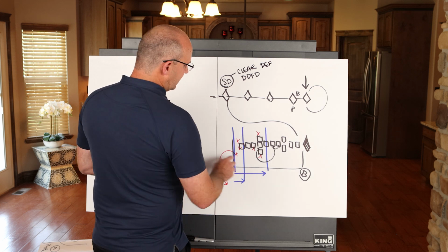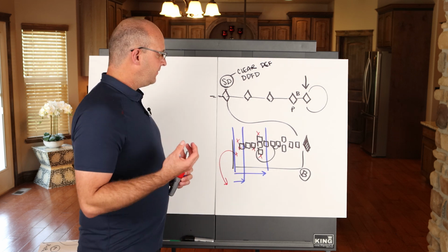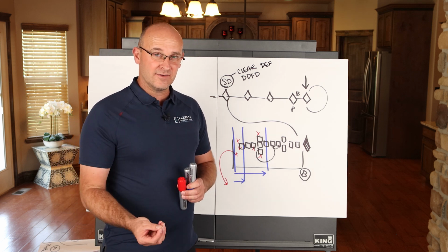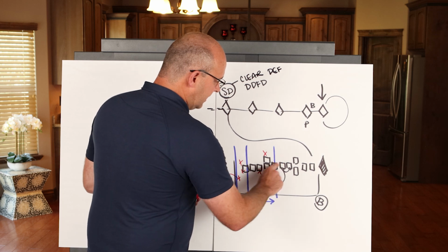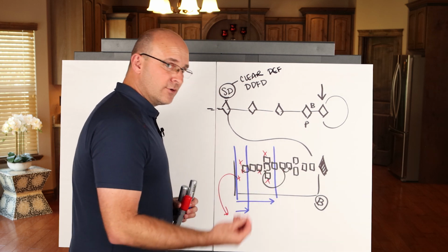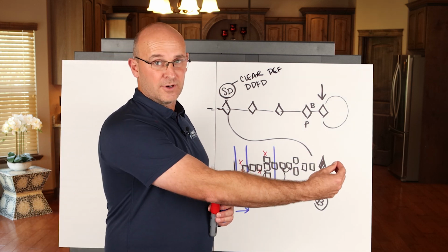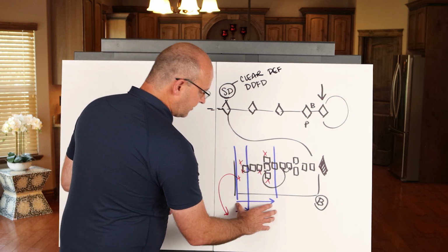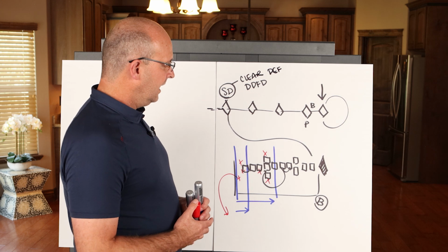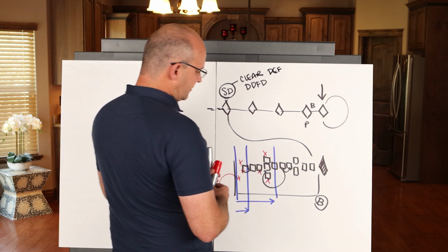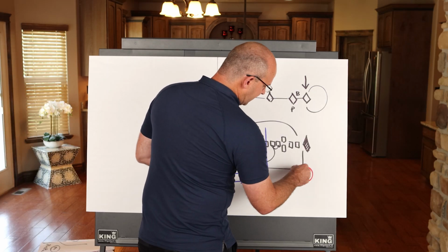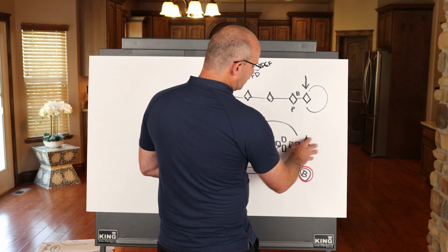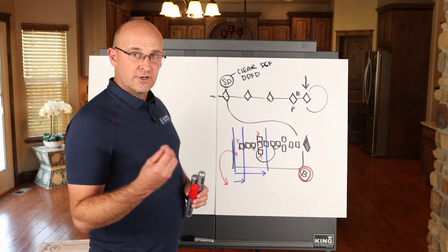So this is a really nice revolving system, and if you keep it dynamic enough, and if you can stay ahead of it, and if you can understand the interconnections in this iterative design, this non-linear process, and really make the designers feel listened to, this right here can really become a remarkable process. And as you're going, obviously you're tracking whether or not you still have buffers or how fast you're eating into the buffers. And if you ever get past or start projecting past your milestone, you can obviously recover.